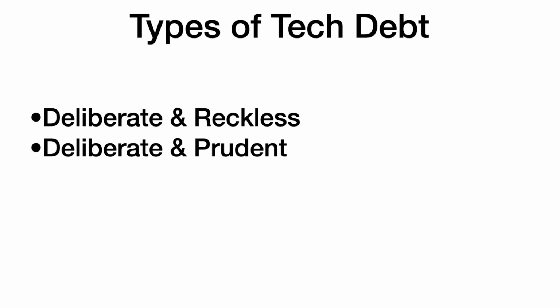In this type of technical debt, the team analyzes the risks and creates a plan of action to carefully and effectively handle the consequences of the tech debt, thus reducing the harm to a minimum. Once your organization achieves the goal or meets the deadline they were aiming for, the team goes back to fix all the issues, refactor the code, and apply the best practices.